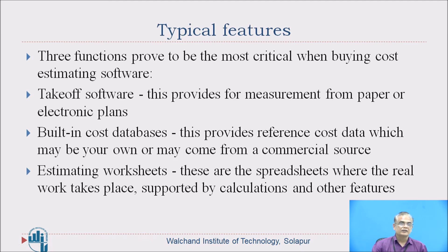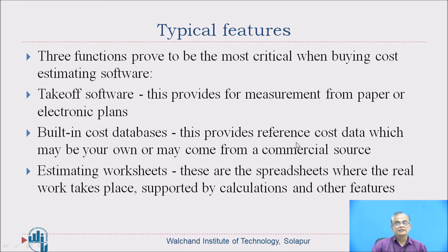Typical features of these softwares: three functions prove to be the most critical while buying cost estimating software. First, takeoff software, which provides for measurement from paper or electronic plans. Second, built-in cost databases, which provide reference cost data that may be your own or may come from a commercial source. Third, estimating worksheets, which are the spreadsheets where the real work takes place, supported by calculations and other features.